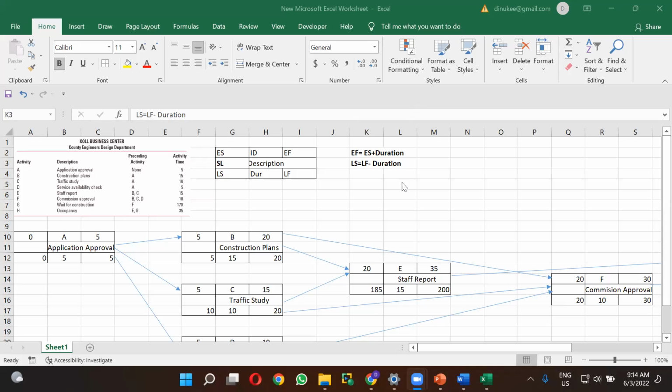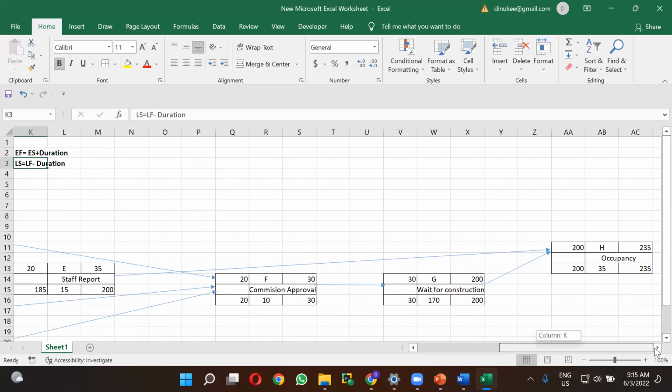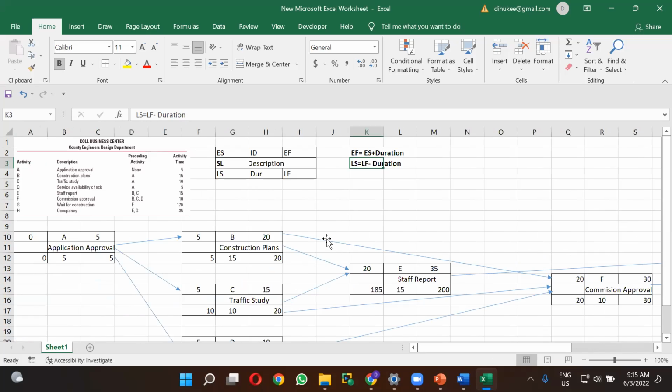How to calculate the slack time? That is another thing that I want to discuss with you, right? Again, the next one that you have to remember is that the late finish time is equal to the early finish time at the last activity. So another thing that you have to remember when completing or drawing the project network is that the late finish time is equal to the early finish time at the last activity. These two. Right. So now we are going to calculate the slack.